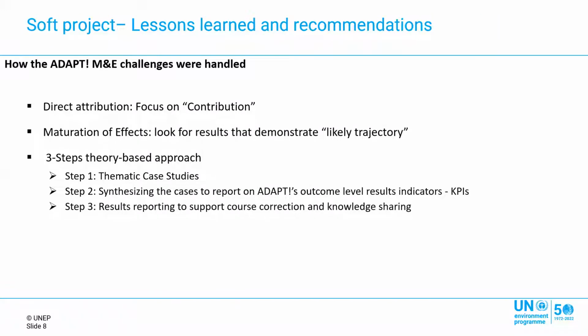So what we did, how we handled it: we discussed a lot with the donor. So we convinced the donor at a certain point that we drop, for example, the first KPI I referred to. Instead of direct attribution, we convinced them that we focus on contribution.